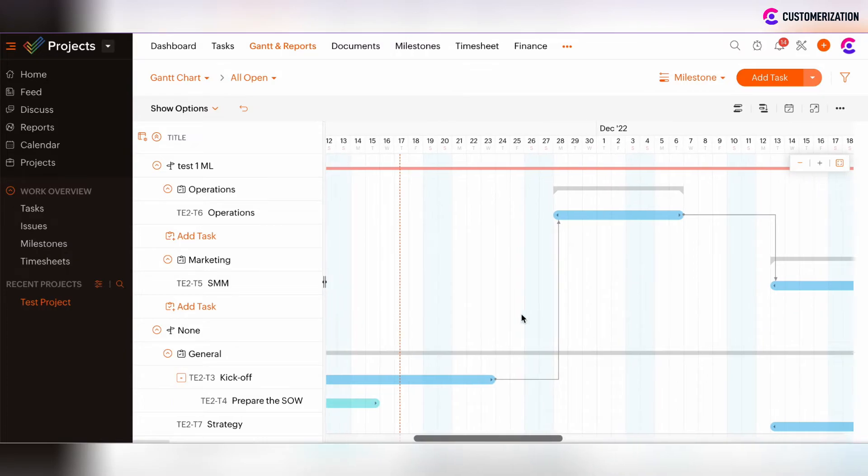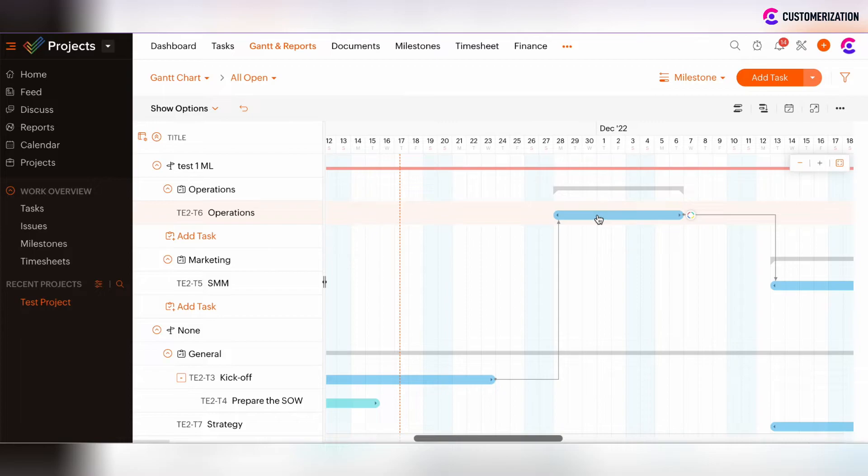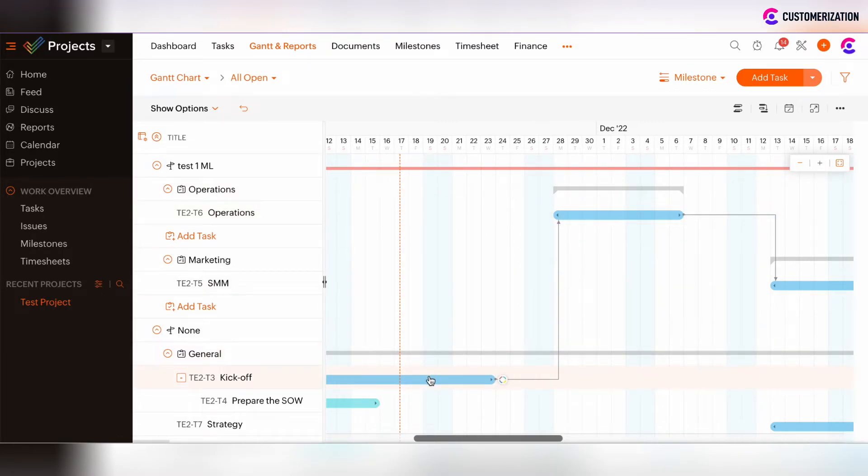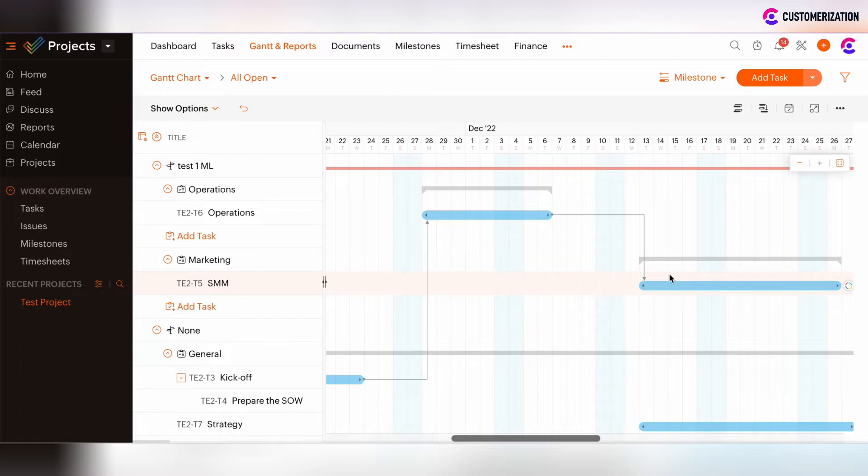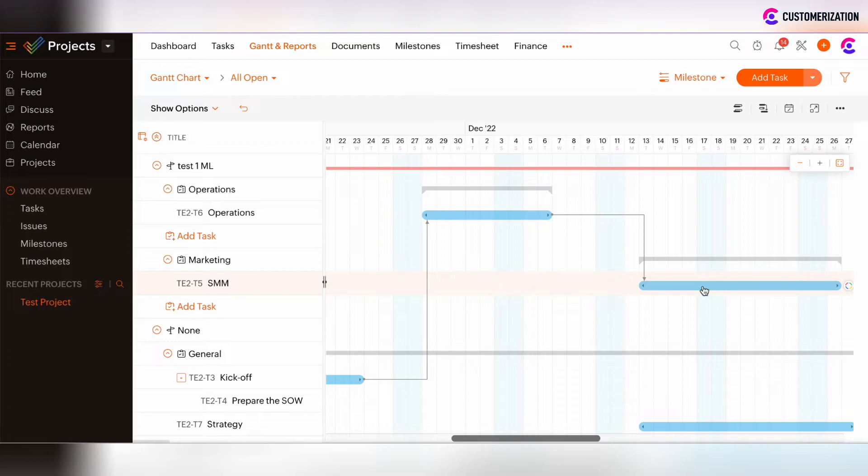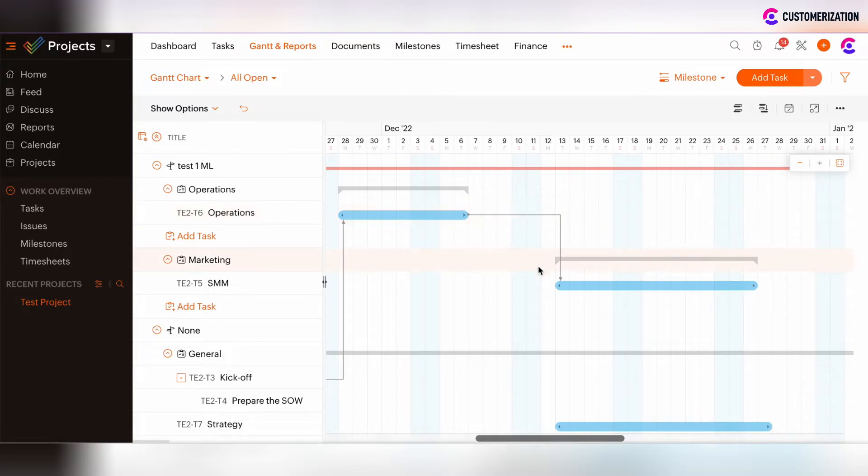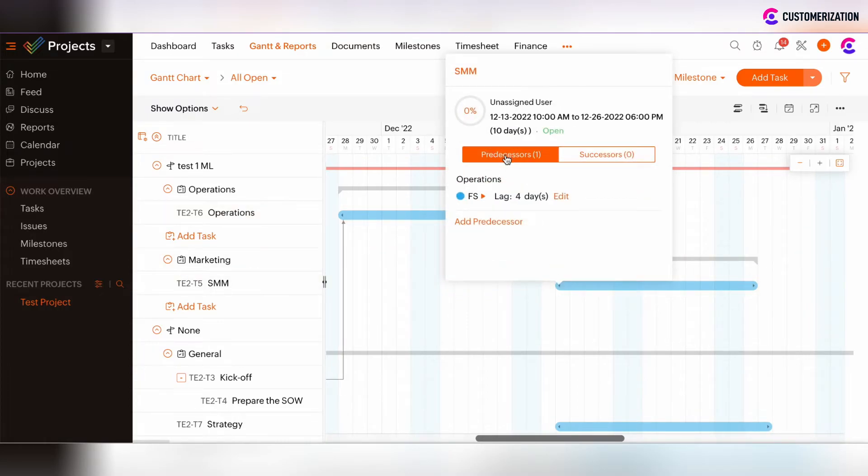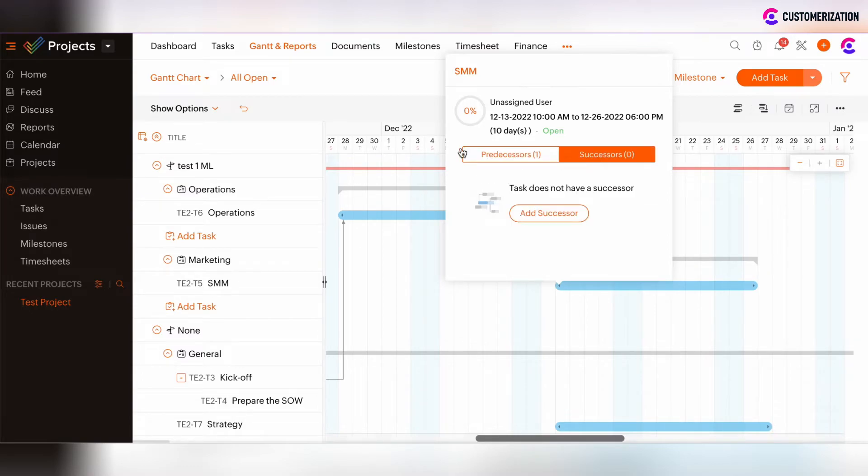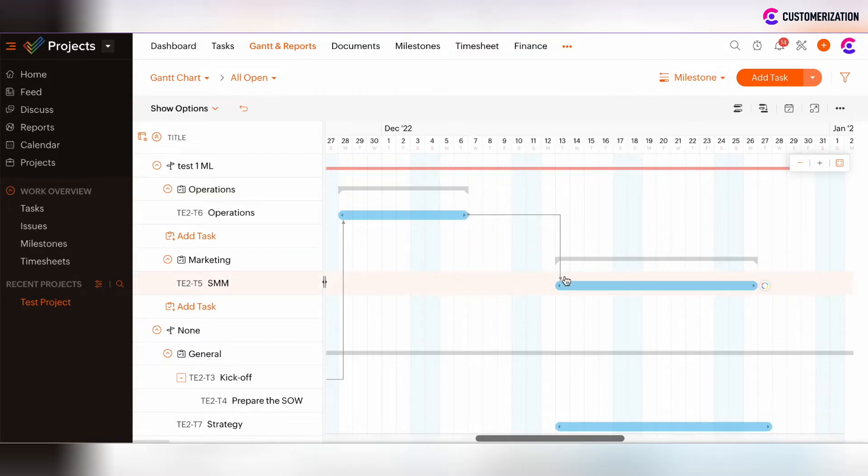So now the logic is that the kickoff task is the predecessor one and then operations task is the successor task for kickoff task. Then operations task is the predecessor task for SMM task and such SMM task is the successor for operations task. So by clicking on the beginning of the SMM task, we will see that there is the predecessor and no successors. And the predecessor of SMM task is the operations task itself.